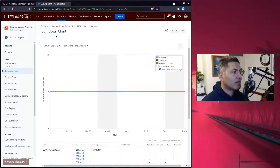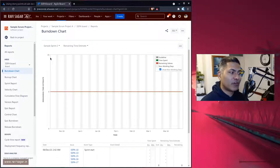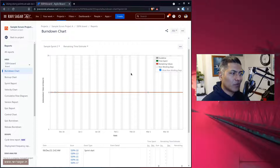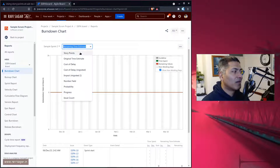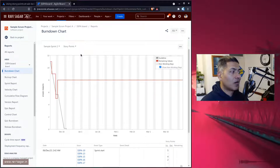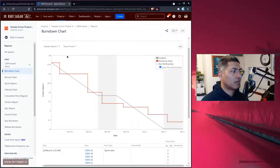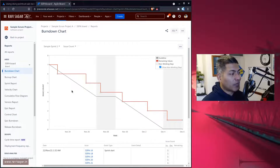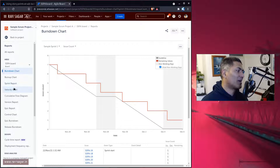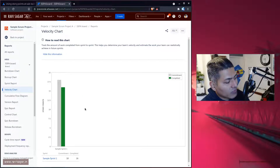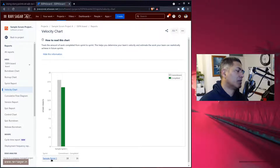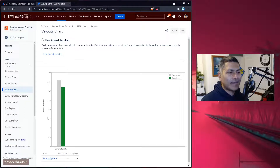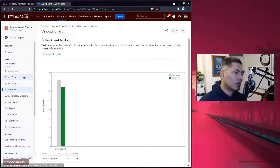This gives a unique combination where you are estimating based on story points but using the time tracking feature to burn the effort. However, this can be a bit confusing if you don't tell your users how to read the reports. For example, you can look at story points or use issue count, but the velocity chart will still be focused on story points.